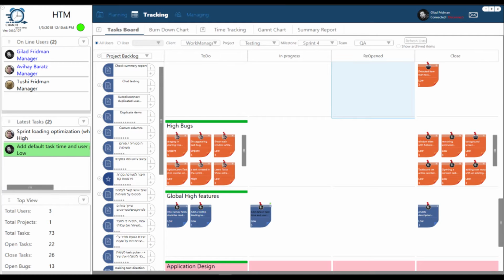Permissions. Each user can only see the relevant task board according to their permission. Also, the type of project affects the options that can be performed on the screen. For example, in a Scrum Agile project, a Scrum Master user who wants to drag a task from the backlog to the board will be warned that it is recommended that this action be performed by one of the team members rather than the Scrum Master, because the team members are the ones committed to the task.